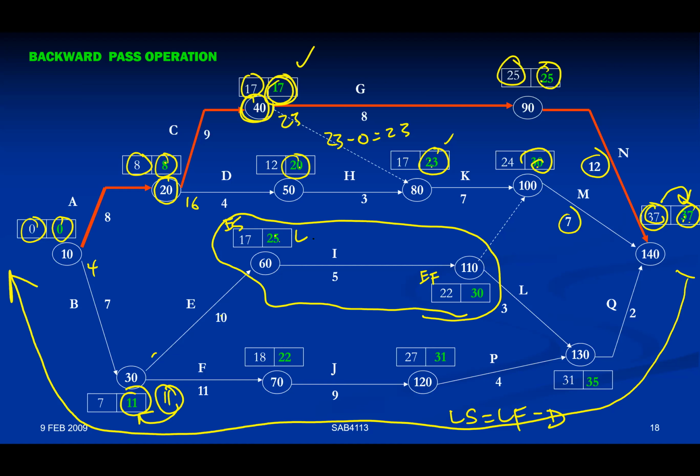Late start is here. Late finish. Okay, the formula for total float is basically late finish minus early start minus the duration of that activity, for that particular activity i. So in this situation, 30 minus 17 minus 5 is the difference that you can get in order to know the value of total float, which is equivalent to 8.